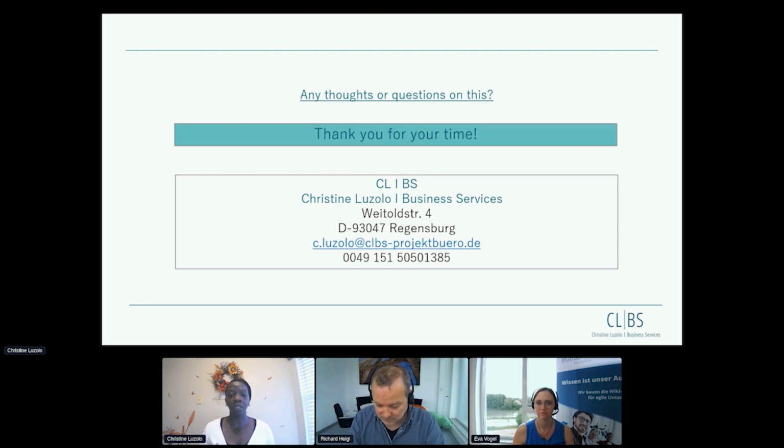This is why the team is supposed to come together on a daily basis. The daily Scrum should not take long. It's designed to take maybe 15 minutes. The main question is: is everything okay, or are there some problems? If the answer is everything is okay, then it doesn't even have to take those 15 minutes. But if there are problems, then the Scrum Master will take this and run to the management and clarify, while the team continues to work.